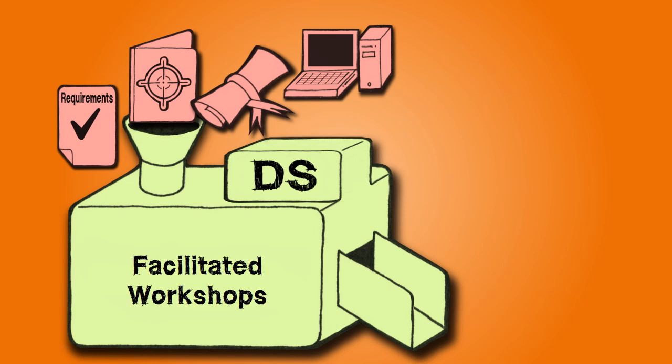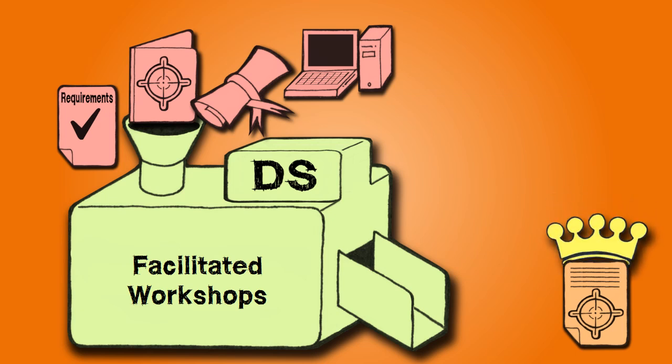The main output of the define scope process is the project scope statement. This detailed description of the project scope includes a detailed description of the major deliverables, the project assumptions, and the constraints on the project. It also has a breakdown of the work required to deliver the product, service, or result. Remember, only that work which is absolutely necessary to complete the project is included in the project scope statement, not any gold-plated items that may come up later.